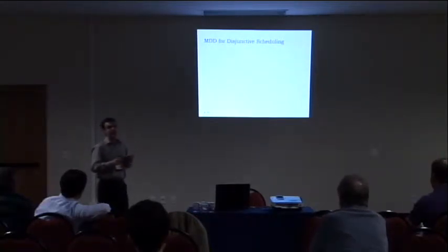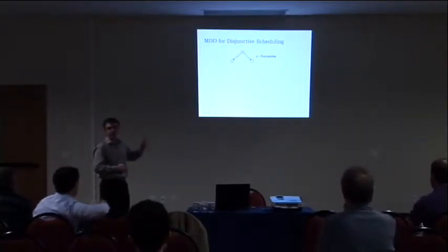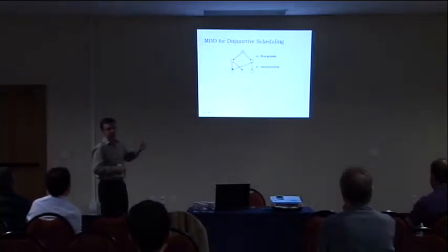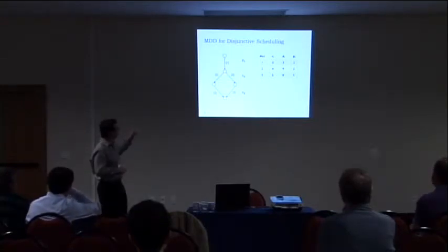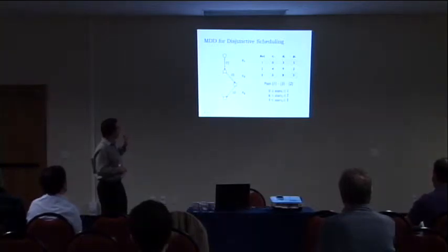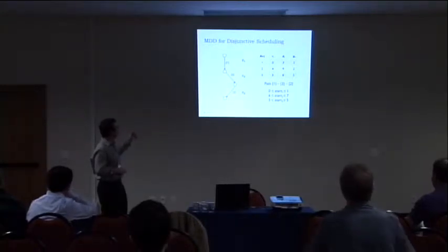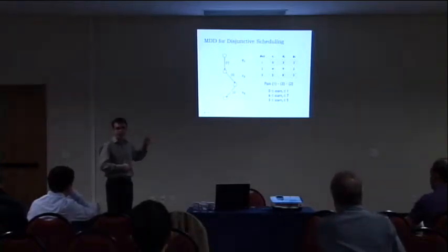So the idea is that we're going to represent a set of feasible sequences. Namely, the first layer of the MDD can represent the possibilities of the first activity, the second layer the possibilities of the second activity, and so on. For example, for this disjunctive problem instance, you can represent it with this MDD. The first activity can only be activity 1, because the deadline is before the release time of these two activities, and then you have all the possible permutations for the other ones. If you take a particular path, this represents the fact that first you are processing activity 1, then activity 3, and then activity 2. And the start times can be easily deduced from that.